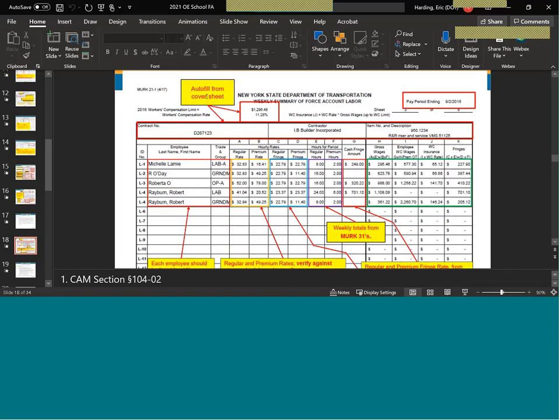Okay, good enough. Top portion here, auto-filled from the cover sheet, payroll limitation. Pay period ending is critical. That should match up with your daily records. We break it down by week, which makes it easy to check and easy for me to review. You just pull out the MERCs ending in 9/2/16, you should have just 4, 5, or 6 or so, and it makes it a lot easier to check the weekly labor.